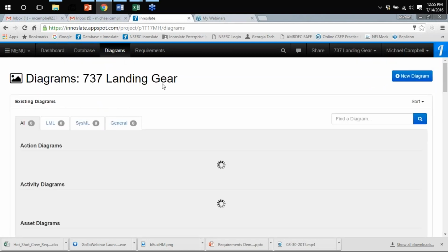So as you do that, you'll also get time constraints. You can do different time variables with this. You can run a distribution. You can run a specific time frame, and that'll also be figured in when you're doing your simulation. So as you create the model of whatever workflow process you're working through, you can add all of this data into it and simulate, and you'll be able to get the export of cost over time, resources used over time, how many resources were used over time.